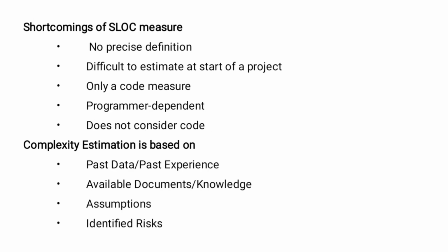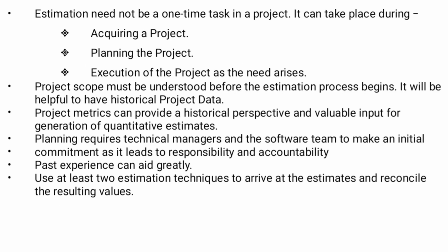Then the next one is shortcoming of SLOC measures: it contains no precise definition, is difficult to estimate at start of project, is only a code measure, is programmer dependent, and does not consider code complexity. Estimation is based on past data or past experience, available documents or knowledge, assumptions, identified risk.